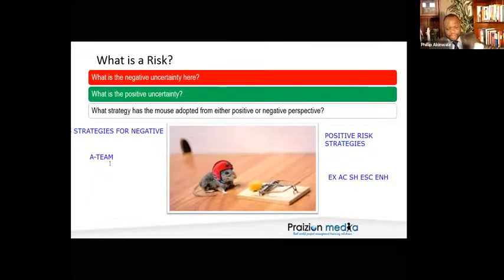All right? This is a very important concept. If all you're doing is saying, oh, if it happens, then we've got money. If it happens, then we've got a plan B. That's just accept. Because you're not reducing, you're not transferring, you're not doing anything. So you need to be very comfortable in identifying when someone is not doing anything before the risk happens. It's accept. Here's $1 million. So what? You're not using it now. You're using it after the fact. Accept. But active accept. Oh, here's a plan B.